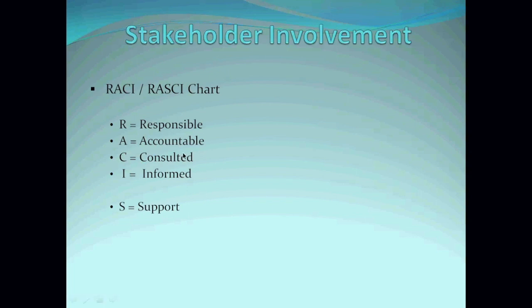And we can say consulted could be probably some directors or maybe SMEs that you need to consult for requirements gathering. So still under requirement gathering, the SME, you can put their name or maybe their job title. Most times you would just say job title. So you can say the SME is consulted. And it could be your project sponsor who is just informed about the business requirement document. So that means the project sponsor would be this.